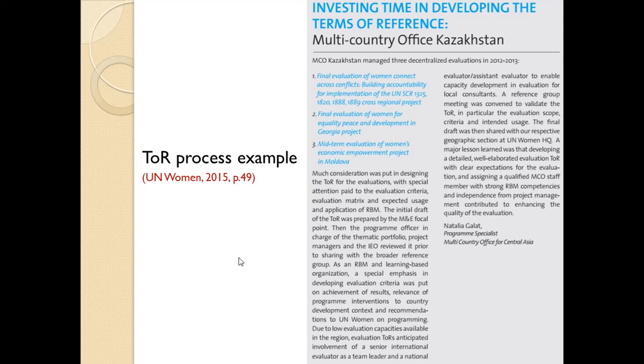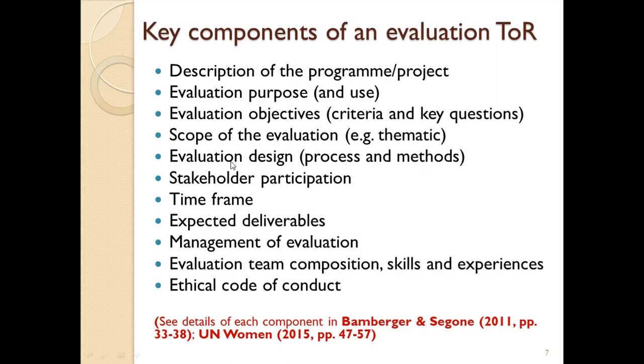So you can see the management of development of terms of reference. It's not just about developing it, but it's also about having discussions about it and having it approved. So you can take your time and take a look. For instance, here you have a declaration that due to low evaluation capacities available in the region, the terms of reference anticipated the involvement of a senior international evaluator as a team leader, in other words, helping in developing the terms of reference. And that is what we are talking about.